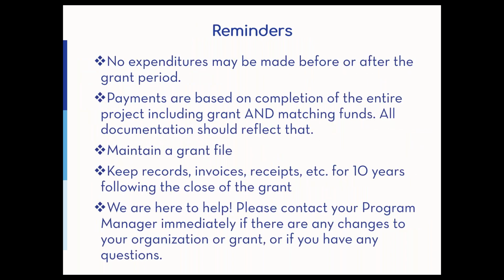Okay, so just some quick reminders. No expenditures before or after the grant period, but you can start spending money now because it's after July 1st. Payments are based on completion of the entire project, including grant and matching funds, and all of your documentation should reflect that. Make sure you keep a grant file, keep all the records, invoices, etc. for 10 years following the close of the grant.